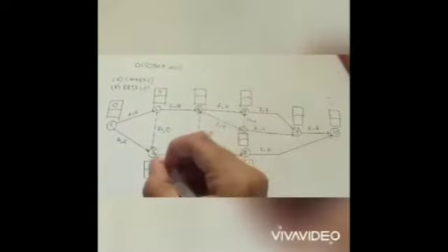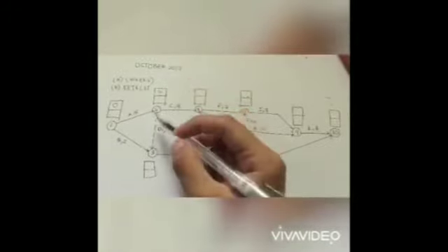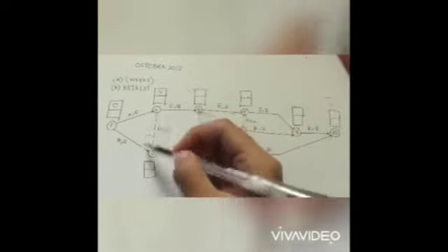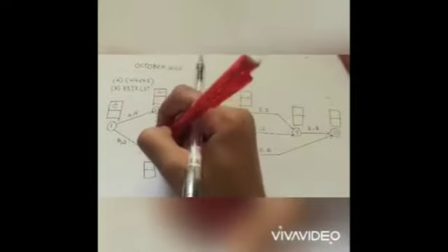So I may start with 0. So 0 plus 5 here we will get 5. And then for activity number 3, there are 2 arrows. So dummy, the value is 0. Okay, for this we have to add one by one and choose the highest. So I use the red pen, so you guys can see, 0 plus 2 you will get 2, 5 plus 0 you will get 5. So between 5 and 2, 5 is the highest, so you have to put here 5.